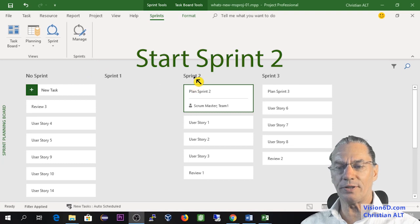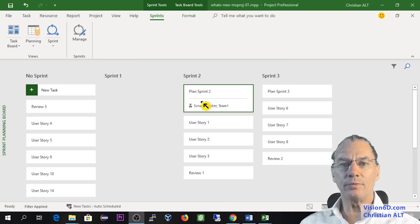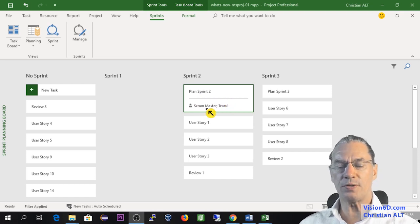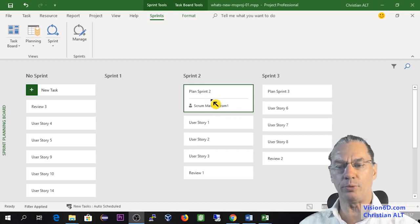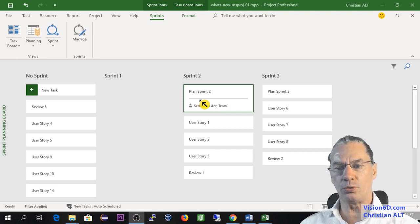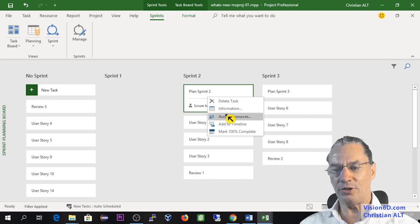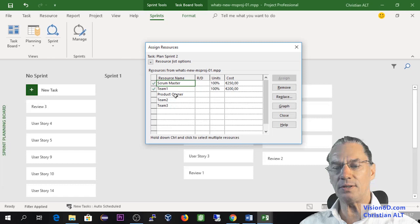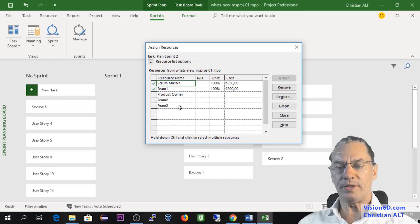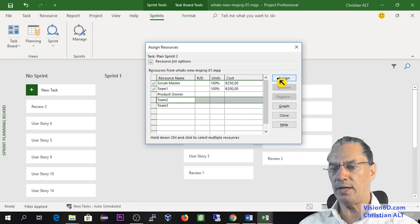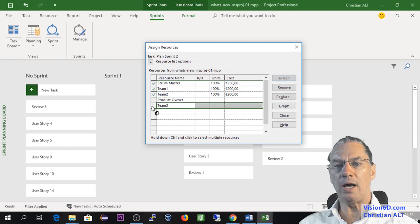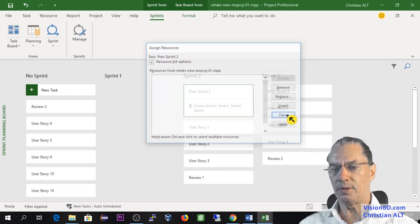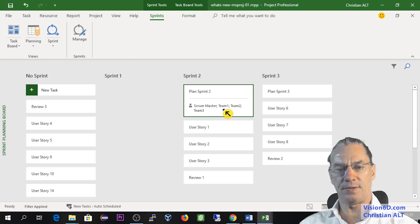So now on the planning, we are going to start the Sprint number 2. I have advanced a bit and I have already assigned some resources, which is the Scrum Master and Team Member number 1 to plan the Sprint number 2. But I'm also going to add the other team members. And for this, I'm going into here, Assign Resources. And you see that I have all the people participating in the project. So I'm going to select Team 2 and assign. And as well, I'm doing the same with Team 3. Now I can close and you see that they've been added to the task.